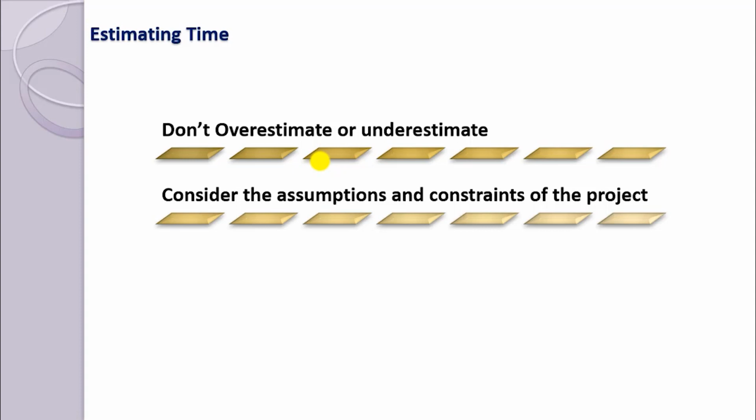In those cases, I have handled it in such a way that I go to the client and tell them that this is a high level estimate, but when the team comes, we'll analyze the requirements further, and then we can give a detailed estimate which could be revisited.